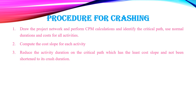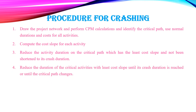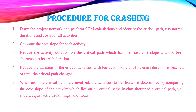Step 3 — Reduce the activity duration on the critical path that has the least cost slope and has not been shortened to its crash duration. Step 4 — Reduce the duration of critical activities with the least cost slope until the crash duration is reached or the critical path changes. Step 5 — When multiple critical paths are involved, determine the activity to be shortened by comparing cost slopes of activities lying on all critical paths; adjust activity timings and floats accordingly.